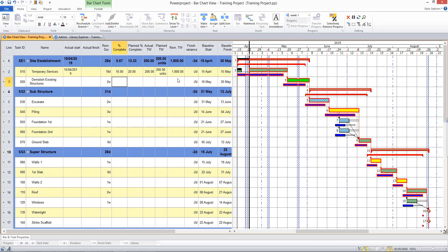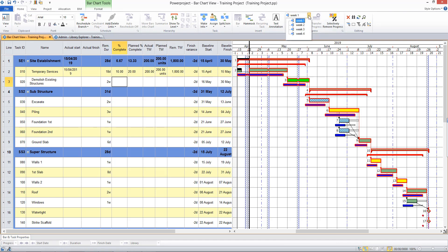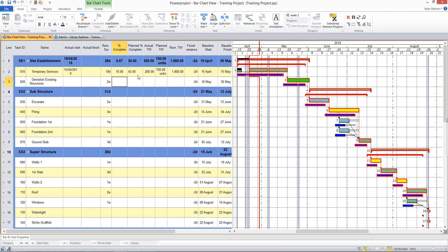When I go back to my project, to update progress in Week 2 of the project now, I can come to the Progress section and change the progress entry period to Week 2. I'm showing a new line in a new color, and my planned percent complete is now 45%.